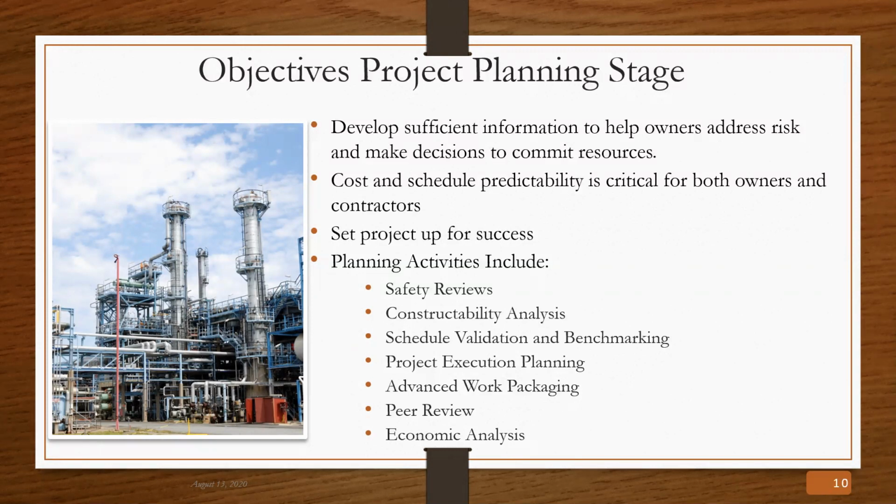Also, during the project planning stage, you begin to set your project organization. You begin to look at things like your contracting strategy and your construction methodology, and begin to set your project up for success. If that work is not done at the beginning stages, you'll find yourself sometimes struggling later in the project. Some of the key activities for the planning stage include safety reviews,